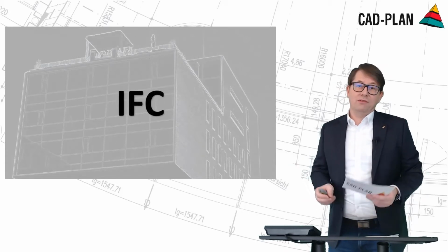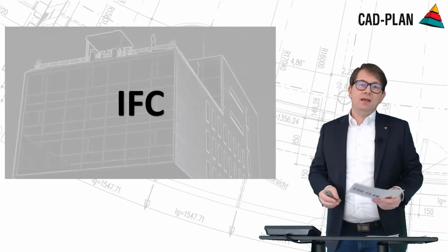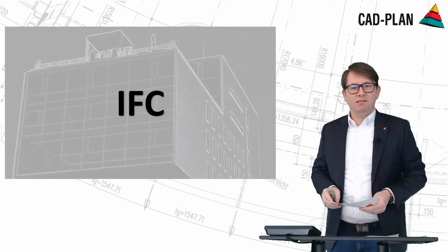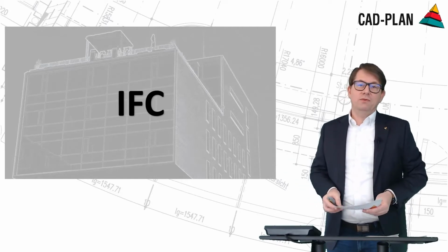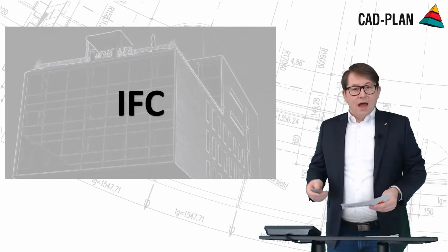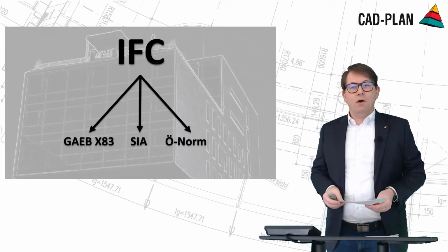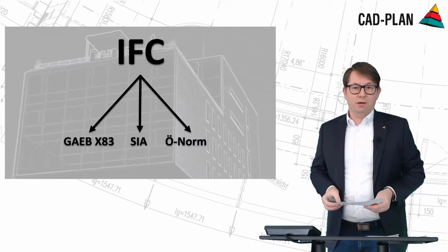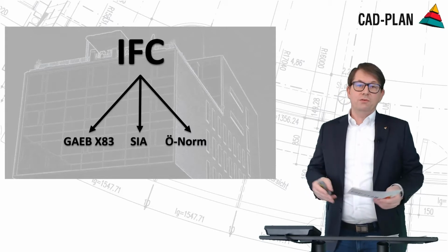Ideally, together with an IFC file, because then you can view the building in 3D, and depending on what you are using, show only your windows, doors and facades and hide everything else. As already mentioned, this is best achieved with the Autodesk Web Viewer. From this IFC file, for example, the tender is extracted. That means that the tendering office takes the IFC file and reads it into their tendering program. A file is created and you can then easily read it into the ERP software and use it further.